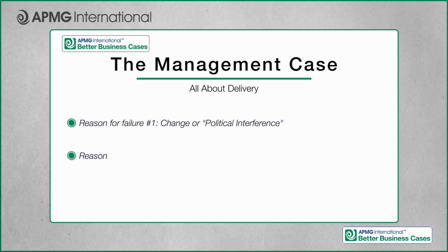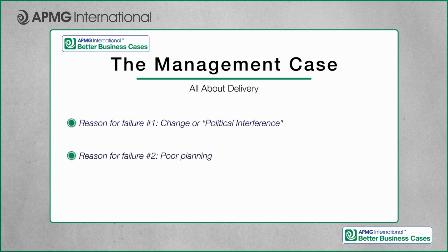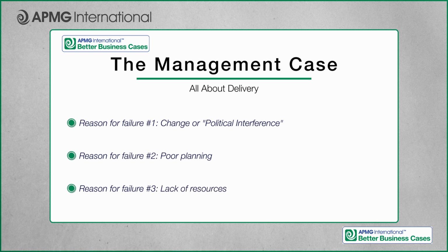The next one is poor planning, a poor business case. Well, I'm covering that off in this conversation. The third reason, and it's a major reason, is lack of resources. We simply haven't got the competence and capability and the resources to deliver the services we need. So we end up with Nightingale hospitals, where we've got the hospital, but we haven't got the staff to provide the service. The management case is all about bottoming that out.